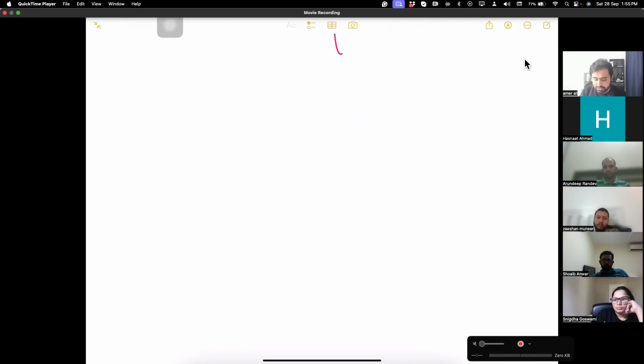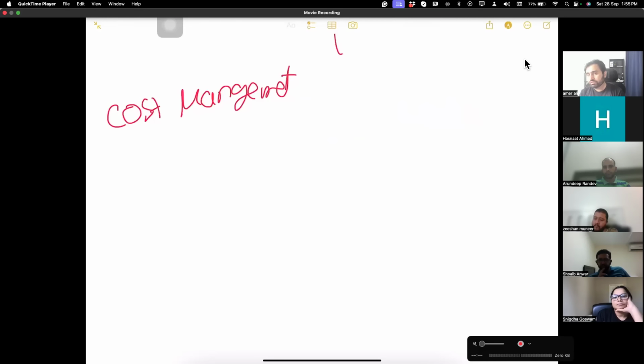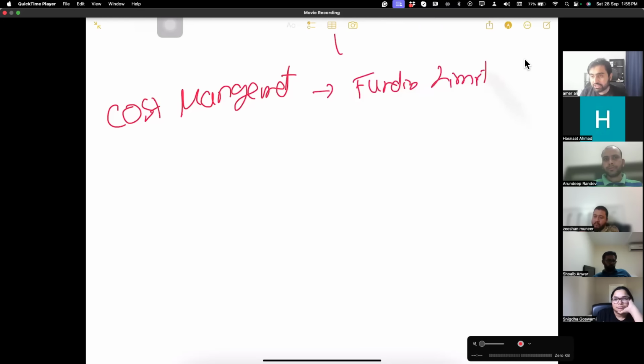Once you have that, and you made a cost management plan that defines how you are going to use the money, which currency you are going to use, who is going to finance your project, and also we define what is funding limit reconciliation. Funding limit reconciliation is basically instead of giving money in one go, you pay in parts. You give them the money, you check how much money you have given, how you can recollect it, things of that nature.